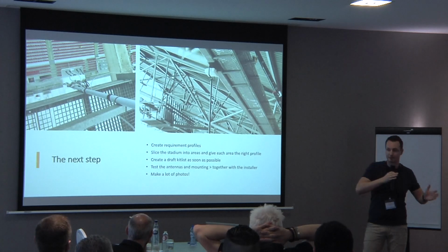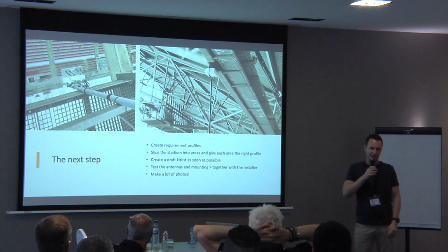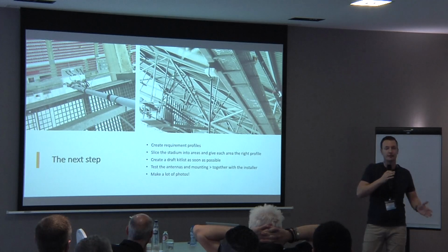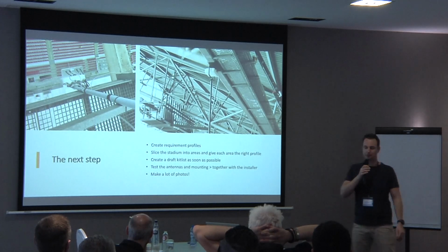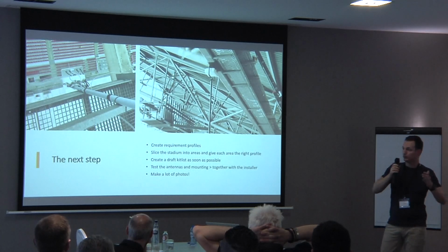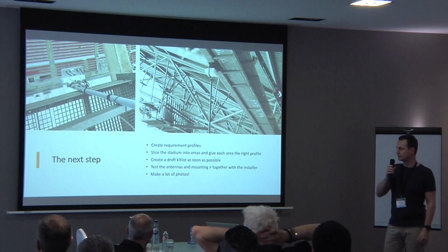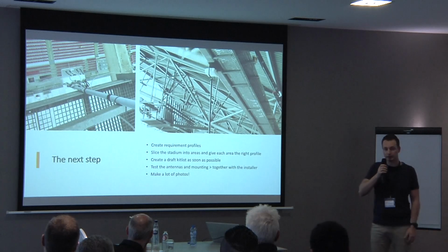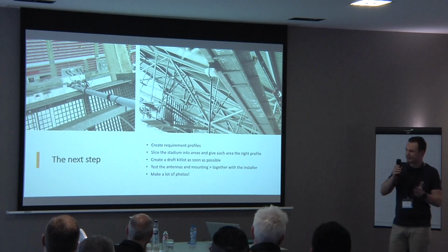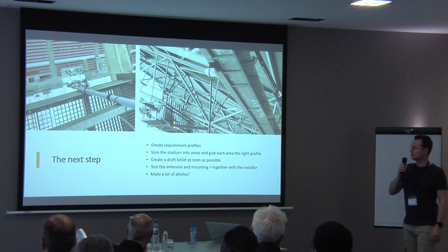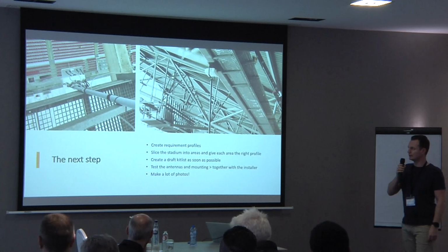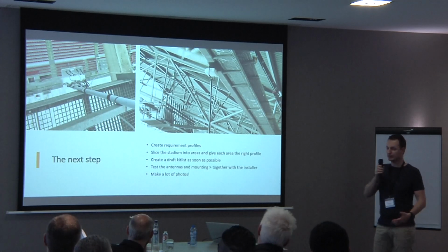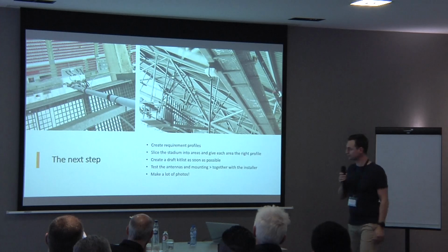If you wait for the final design, it will take too much time in delivering all the APs and in delivering the project. So it's good to know quite early in the project what kind of APs you want to order and the amount. It can change later. If it's some more or less, it's less painful than having to wait a couple of months longer.